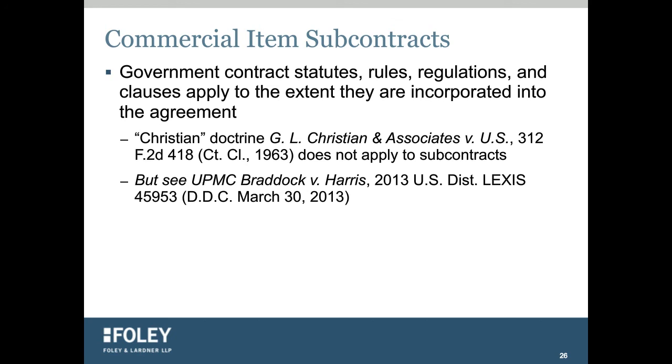They're not self-deleting. There's a Christian doctrine which applies to prime contracts, which says that clauses that are fundamental to government contracting are read into prime contracts, even if they're not included in there. Now, notably, though, the Christian doctrine has not been applied to subcontracts, with one exception. And that exception is this UPMC Braddock case, which talked about the equal employment opportunity requirements that Miha had mentioned. So that case said that those requirements were read into the subcontract, even though they were nowhere in the subcontract.